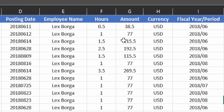The amount column represents the dollar cost of the resource working that day. This is derived by taking the number of hours worked and multiplying by the employee's hourly rate, dependent on which country they're located in. The currency is measured in US dollars, and if resources are in other countries, the conversion is calculated to US dollars. Finally, the fiscal period represents the fiscal month that the employee worked.